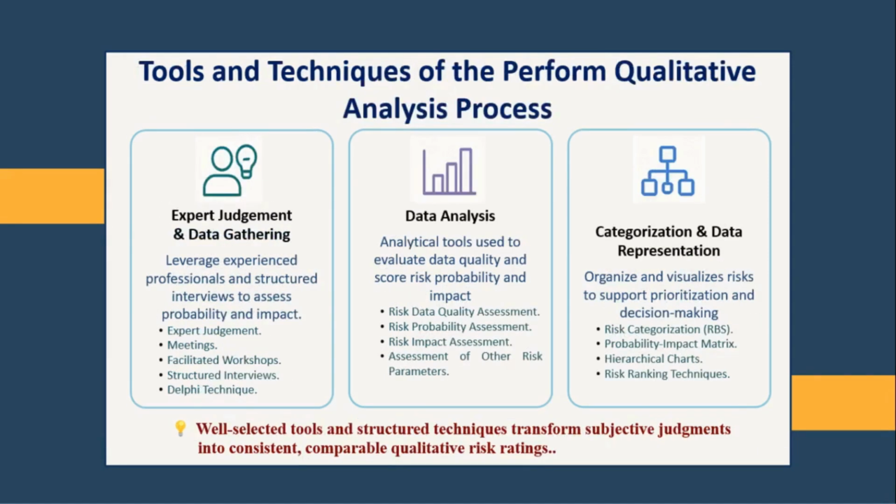Qualitative risk analysis relies heavily on expert judgment, utilizing the insights of both internal team members and external specialists. Data is gathered through structured techniques such as interviews, workshops, and consensus methods to capture these subjective assessments. To ensure accuracy and reduce individual bias, it is vital to involve multiple perspectives in this evaluation process.